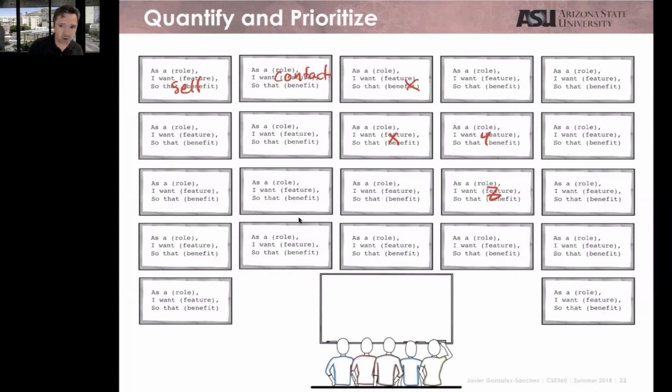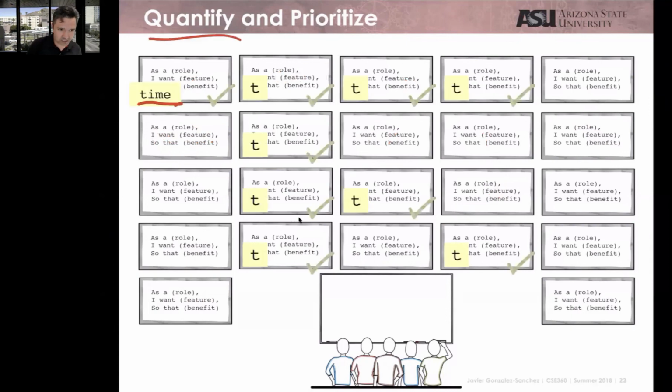Like, I want to register a user. Okay, in order to register a user, I need a web page where the user puts the data, and I need a connection with a database to store the data. So how many hours do you need to create one HTML page, one backend software that receives the data and connects maybe with a database and stores the data? How many hours do you need for that? For each of these activities, give me the time.